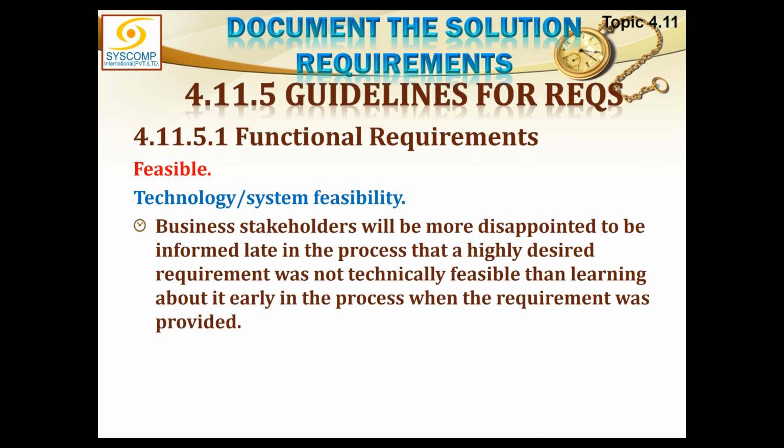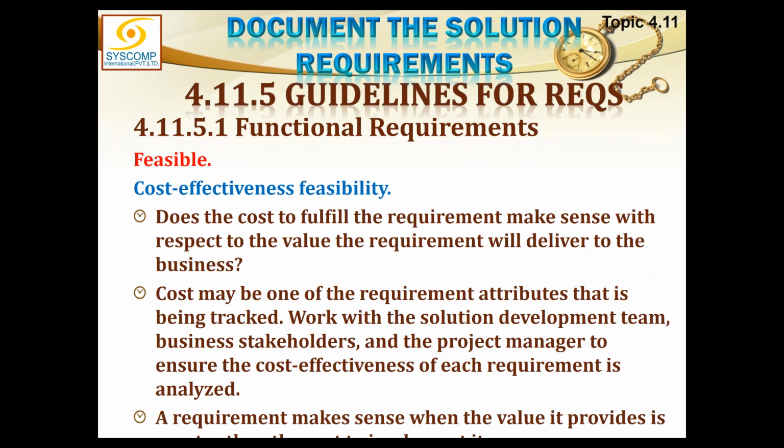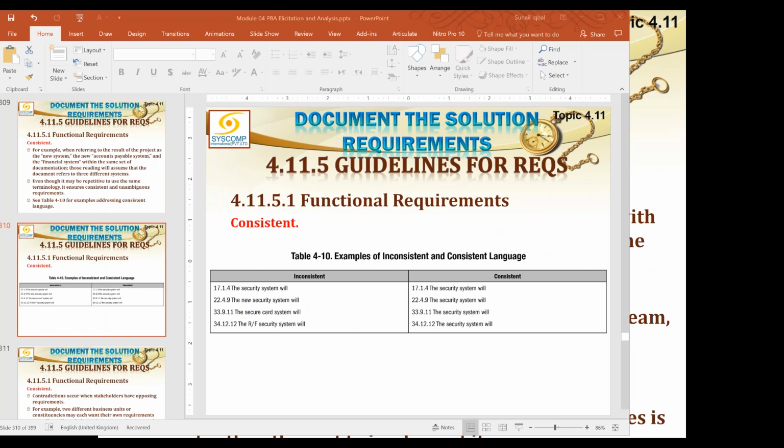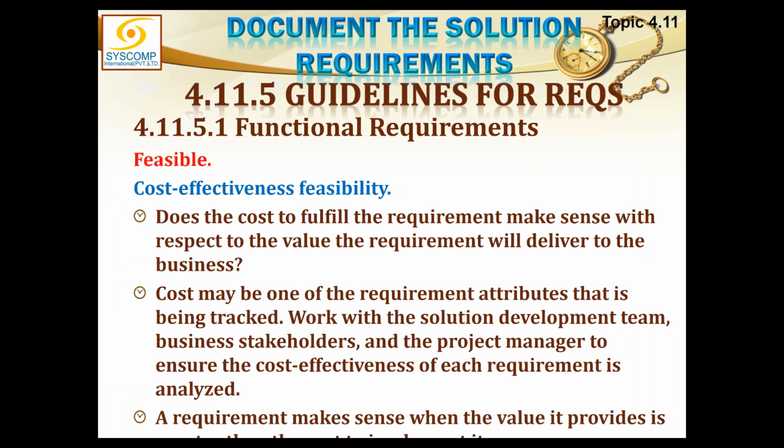Stakeholders will be more disappointed to be informed late in the process that a highly desired requirement was not technically feasible than learning about it early in the process when the requirement was provided. So share it with the business stakeholders as early as possible, so that their needs and expectations can be kept in check. Cost effectiveness: does the cost to fulfill the requirement make sense with respect to the value the requirement will deliver to the business?